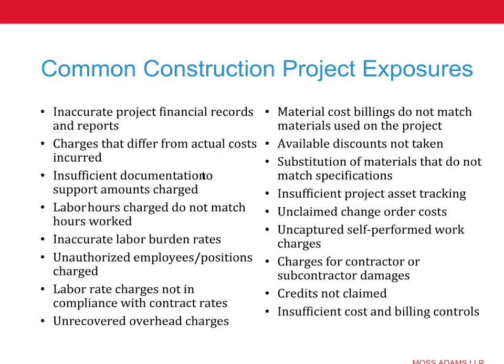We'll see on the labor rate side of it, when rates are being negotiated and agreed to with the owner, a lot of times we'll see that the contractor that is proposing the rates doesn't have a good understanding of all the costs that are going into the rates or the profit related to them. And in some categories of labor, they're losing money every time the people work under certain rates, and in other rates, they may be making money, but it's a lot left up to chance because there wasn't a good historical perspective, a good look at historical cost related to the people that are being bid on the job and the rates that are being negotiated.